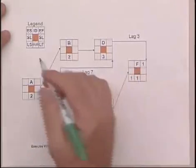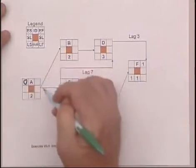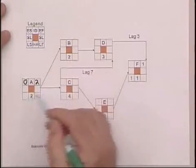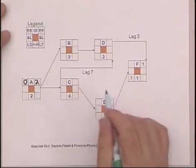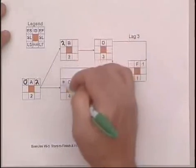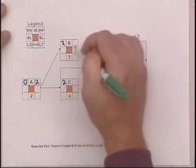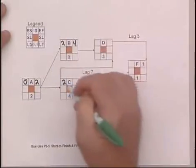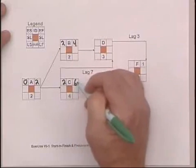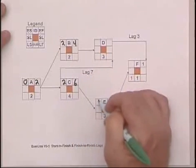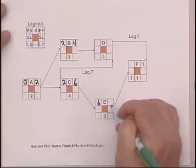So, again, we start with zero for the first activity. The earliest it could be completed if it's supposed to take two days is the second day. We can start both B and C. Two plus two is four. Two plus four is six. Then E can start. Six plus three is nine.